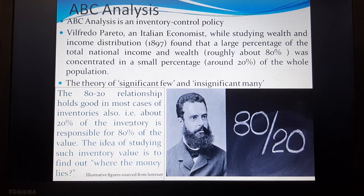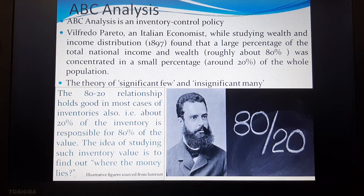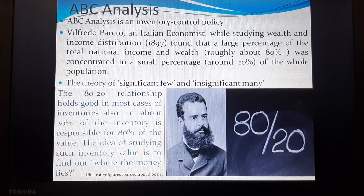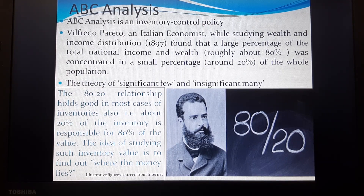This 80-20 relationship holds good mostly in the cases of inventories as well — meaning 20 percent of the inventory items is responsible for 80 percent of the value. This idea is about studying the inventory value to find out where the money lies. This is a major finding of an economist which is applicable even in the construction field.